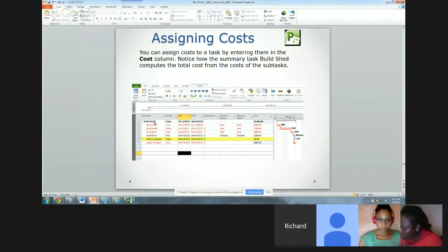That shows how, when you assign the cost to the subtasks, it's automatically going to add up the total in your first line. So for the store that you build, you can say build store, look right there on the top line and see what it's going to cost, and then see the various components of that.